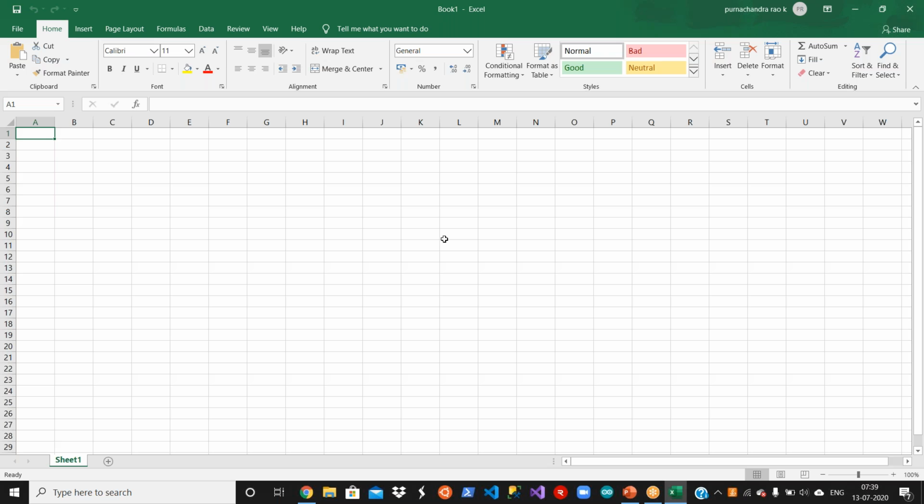Okay, so now what is capacity planning? So you have a couple of people, right? Let's say Rahul, Purna, and then Ravi, like this. Okay, now basically what is the total capacity per week? 40, right? And it is 2 sprints, right? That means 2 weeks. That means again it will become 4. So total is 80, right?